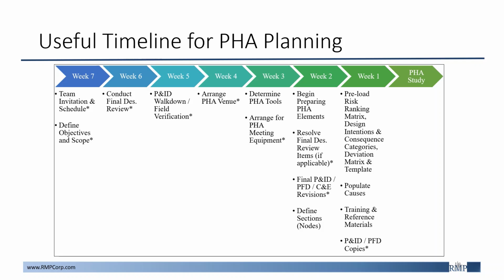An example of this can be pushing back the completion of the P&IDs, which can ultimately leave the facilitator without an ample amount of time to properly pre-cause the system. This can result in more time being spent during the session developing scenarios, which prolongs the sessions.